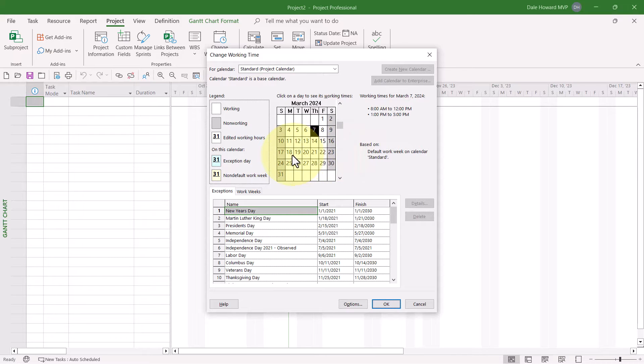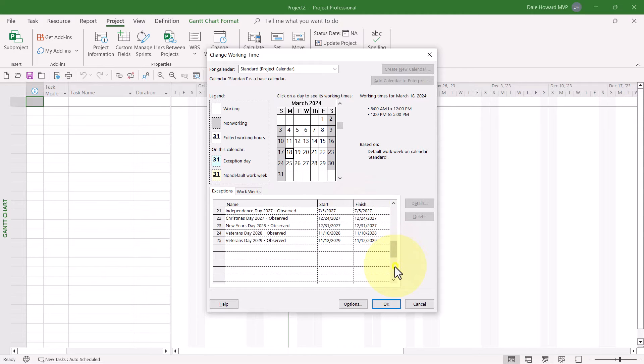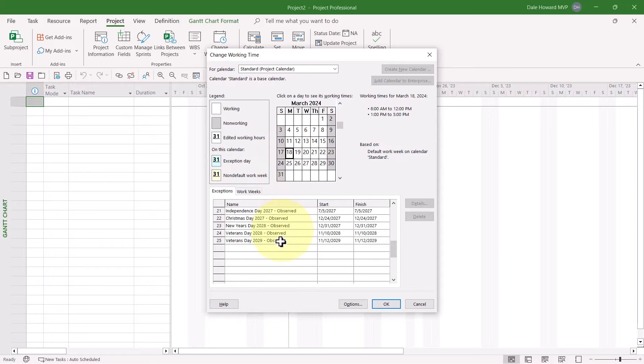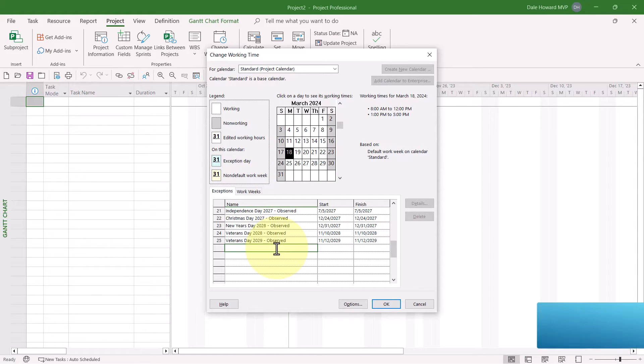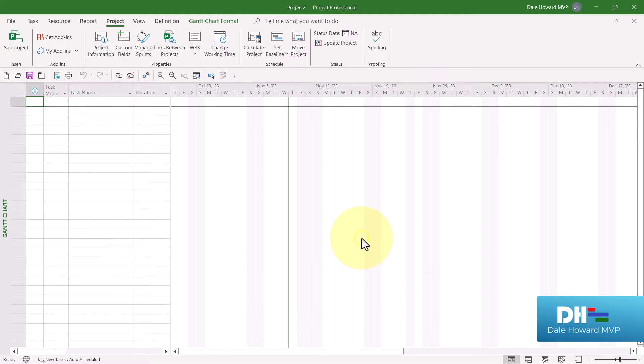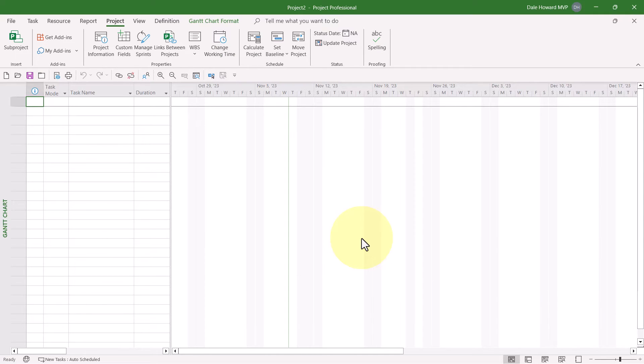If I try to add a company holiday, such as Founder's Day on March 18th, I can select the date in the calendar grid at the top, but if I try to type, I'm blocked. So you don't start this process from Microsoft Project, but you do need to have Microsoft Project open and connected to PWA.